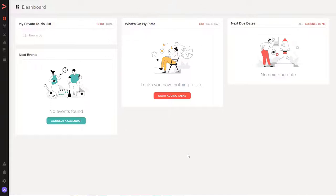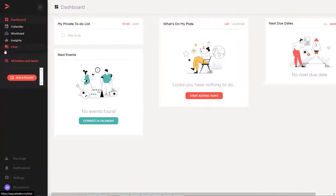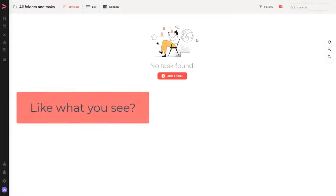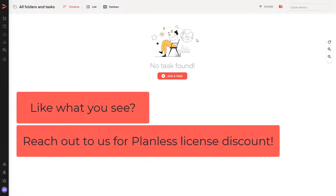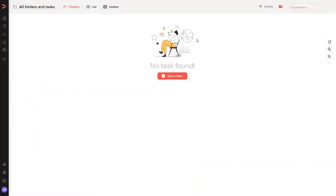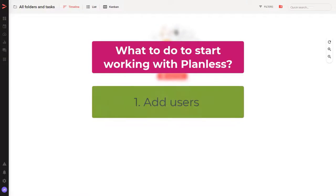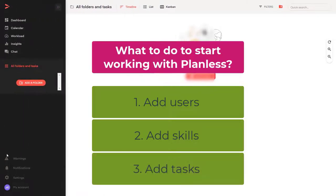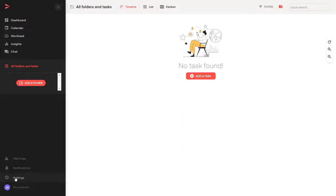You can see that currently I have nothing in my workspace — no tasks, no folders. If you click to display everything, you'll see there is nothing here. To start working with Planless and use all of its features and strengths, we need to do three things: first, add users; then add skills, because Planless heavily relies on skills; and finally, add tasks.